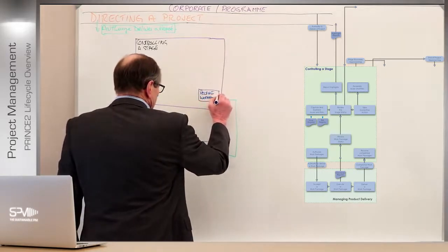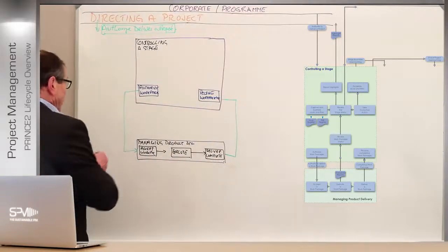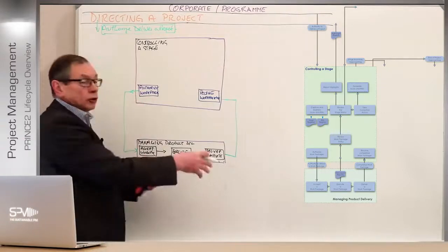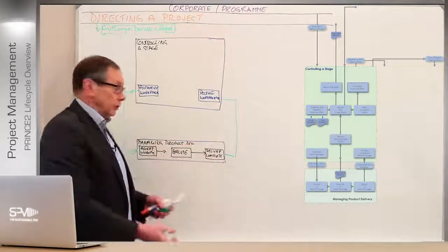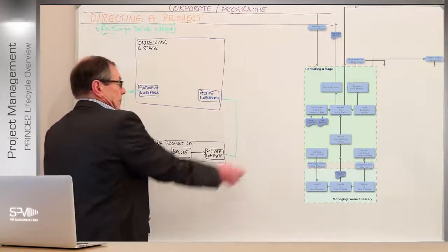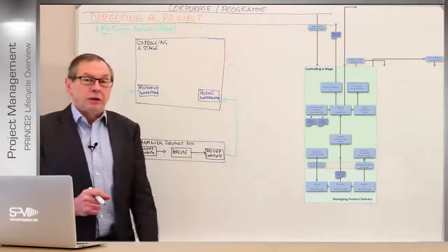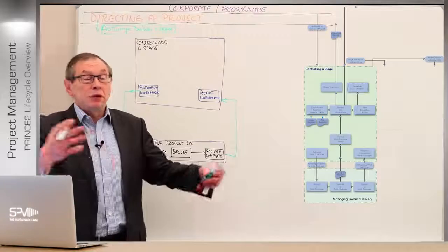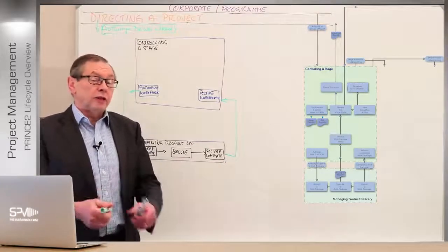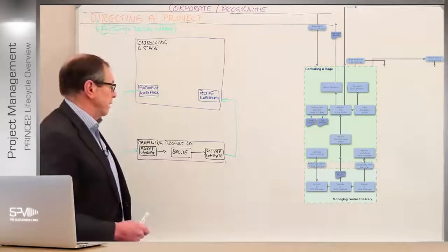So this is really what goes on here. Authorize the work package, agree that with the team manager. Team manager takes it, goes to the group, wherever they happen to be, internal, external suppliers, doesn't matter. Execute that, build the package, deliver it back, and then the PM receives it. And then, hey presto, what happens next is whatever you decided to happen next. Do I bolt it with other stuff? Do I deploy it? Or do I wait till the end of the project, or program for that matter, usually the project, the end of a tranche in a program.